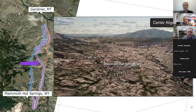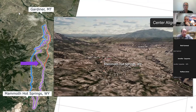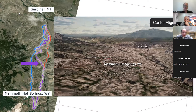Nicole: The next question is for Tom James: What are the considerations for archaeological sites and how would they be affected? Tom: Ideally we'll avoid archaeological sites. Our partners at the Federal Highways Administration have been very good and sensitive — they'll take our maps of the archaeological sites and route the road around them if possible. If that's not possible, we'll work with the state historic preservation officers and our tribal partners to develop a mitigation plan, which usually includes data recovery, excavations, and maybe some interpretation. I can't speak to exactly what we'll do until we've had those consultations and decided on a memorandum of agreement with anything that we will impact.